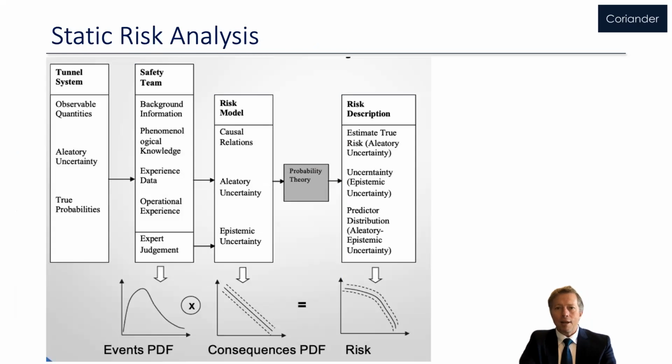The other piece, and this I promise is the last of the geeky slides to present, is that if you're looking to get a numerical assessment of risk, then you end up needing to take the probability distribution function of the events occurring, the consequences as a range of possible consequences in your risk model, and then quite often plotted on an FN curve.